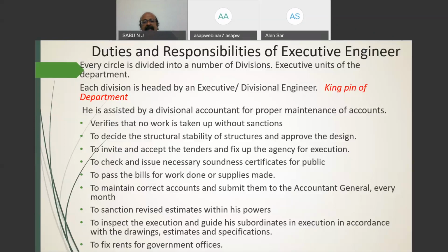That means he strictly controls the work progress in accordance with the plan and specification, so there is no chance for deviation. That can be ensured through the conduct of certain inspections, periodical or surprise inspections, etc. There is some manual or procedure for each department.